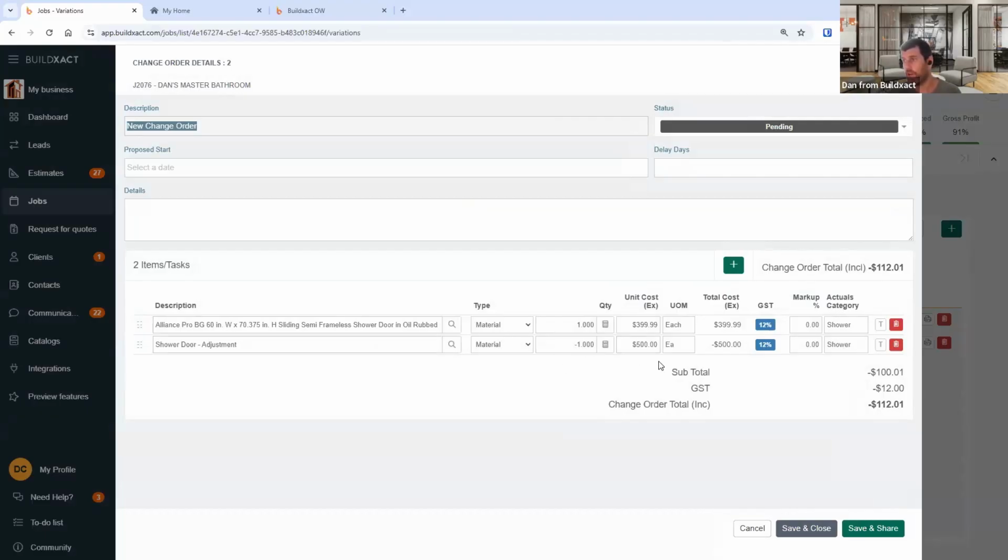One thing that I really want to highlight, because I think this is super important, is this change order automatically has a negative item and a positive item. So the negative was what I put in the original contract. And what we're doing is saying, hey, the allowance that was originally here, it's out. We're now substituting it for the actual picked item, and this resolves the dollar difference if they pick different items.